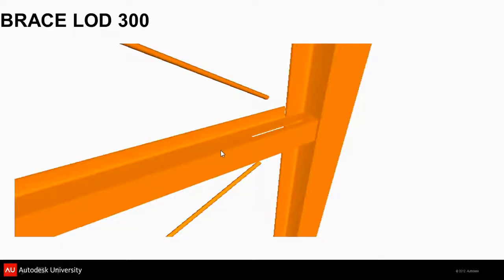So just in summary, if you had a structural model and you're trying to look at where, say, plumbing coming down would be turning out, your design elements at 300 wouldn't really get you there. You would need trade level information for that gusset plate. But you don't need to wait all the way to fabrication when the fabricator has all the threads and fasteners and welds modeled.